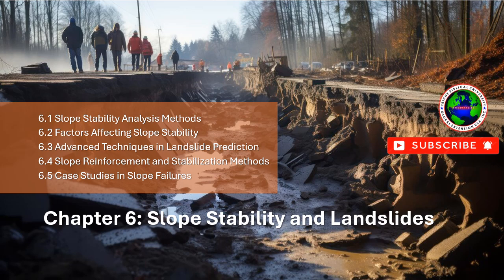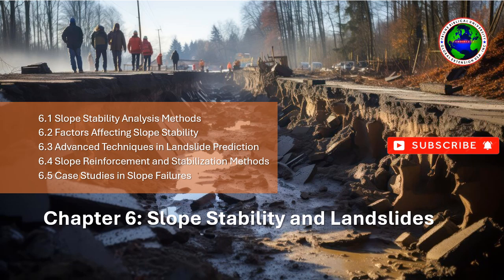A holistic approach to risk assessment that includes geological, hydrological, and structural factors is essential for large infrastructure projects, particularly dams. Monitoring and controlling water levels in reservoirs can have a significant impact on slope stability, and therefore, water-induced forces should be closely managed.